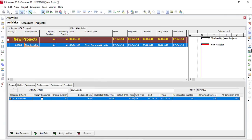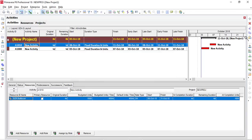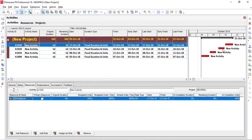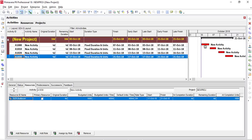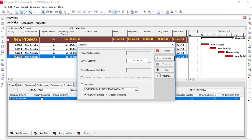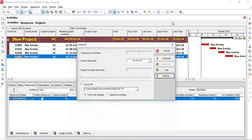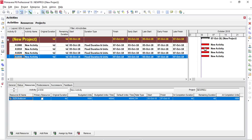I'll copy this activity and paste it a few times. Notice that resource leveling is open, which is pushing the activities apart because the dozer can't work on multiple activities at the same time. Once I remove resource leveling, all activities return to running at the same time.